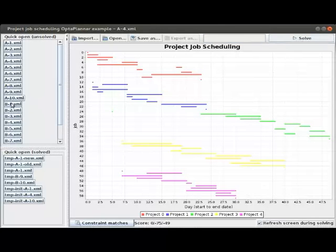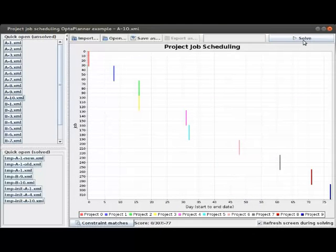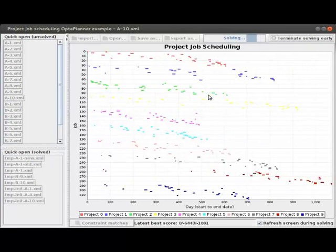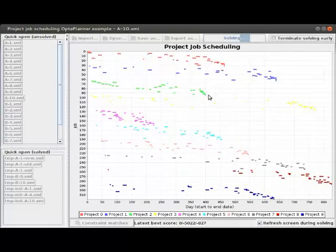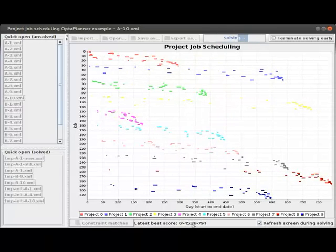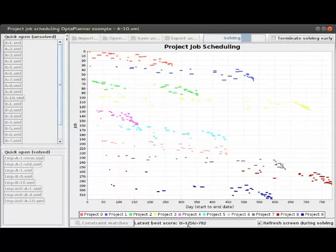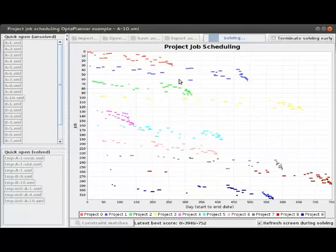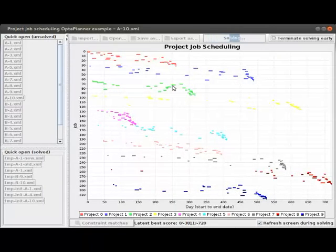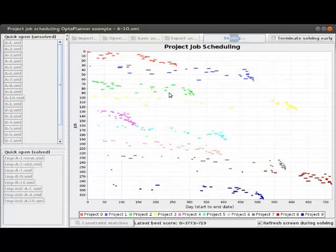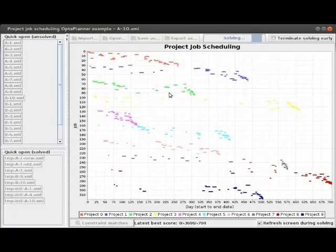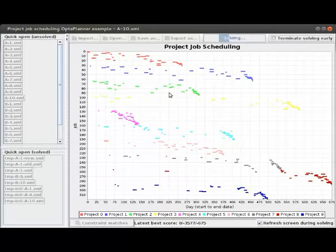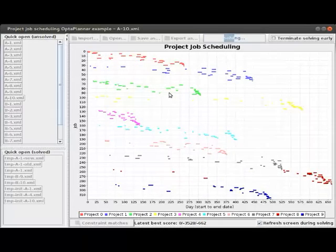Now let's load an even bigger one: 10 projects, over 300 jobs. You can see the days over the critical path decreasing — it started at 5,000 days and is now at 4,000. The solver is constantly changing execution modes, not just job order, to ensure it's using the most efficient resource available for each job.